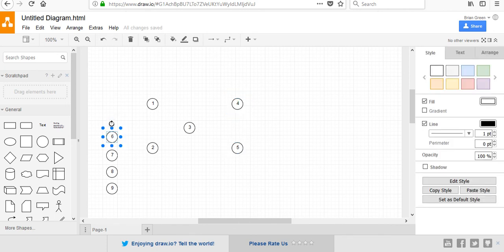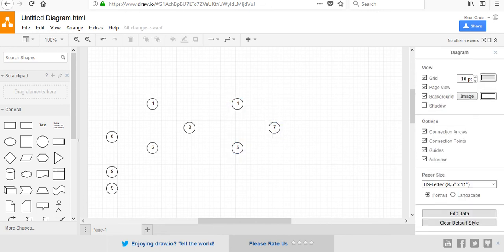that's going to lead me to step number 6, I think, which is installing the new PCs. Of course, I probably can't install the new ones until I unpackage them. So I'm going to go to number 7, which is unpack and image. Now, theoretically, I could unpack and image the PCs before I'm done removing the old ones, because I can do this somewhere else, right? So I could do it all at the same time.